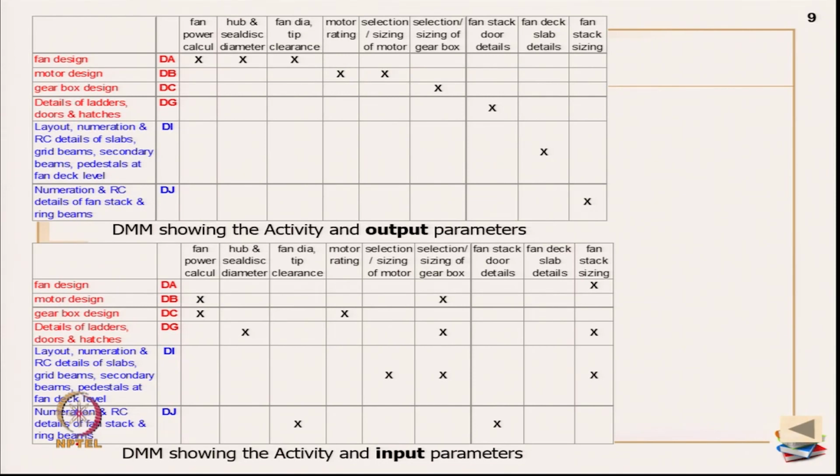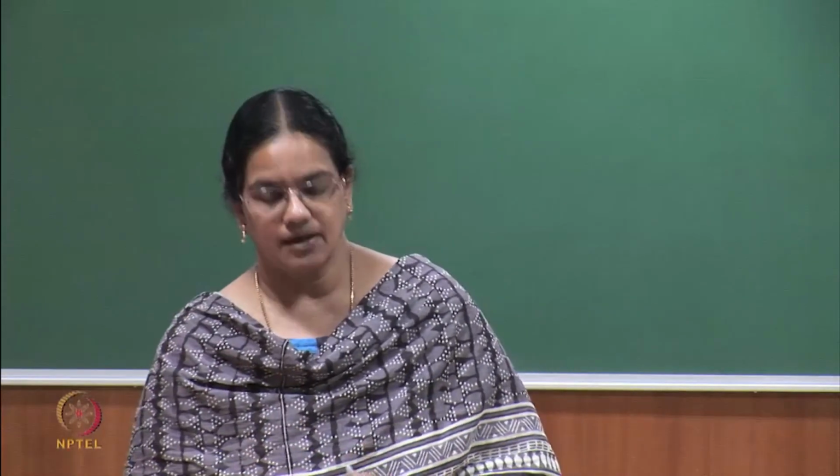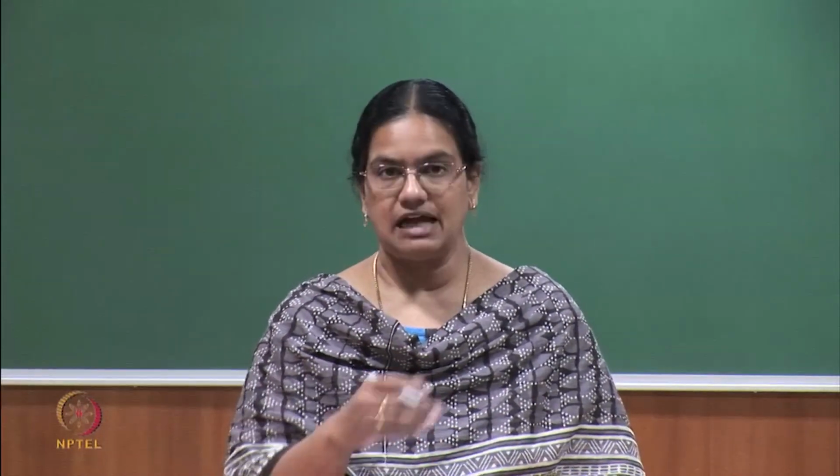Okay. So, with this you can form all the relationships, and what happens here is, any activity will have a set of outputs at the end of the activity execution, and activities also need inputs from other activities. Okay. So, every activity needs a list of inputs. So, when you multiply these two, you will actually get an activity DSM. That is the main purpose behind this, and the logical way of doing this I will show you right now. Manually also you can do it. You make this a binary matrix and multiply the 2 matrices, you will obviously get another matrix.